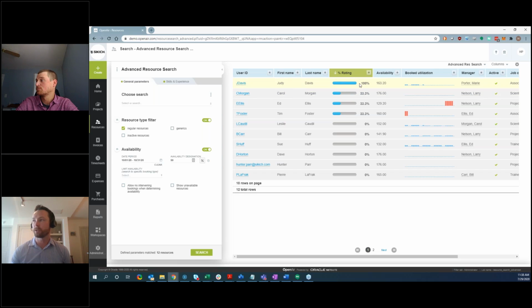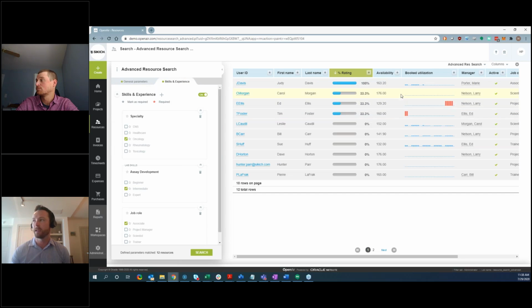So you can see Judy Davis, who showed up, has a 100% rating, which means they met every single piece of criteria that I set. And we have Carol and Ed who met some of it. From the screen here, I can get a quick visualization of what their booked utilization or what commitments they already have scheduled over the time period, to give you extra information on the timing when they'll be available. For example, if I look at Ed here, Monday the 26th through Friday the 30th, he's booked pretty solid. So if I have any idea that that may be a busy week within my project, I may look to another resource. In this case, Judy matches all of the criteria, her utilization looks good.